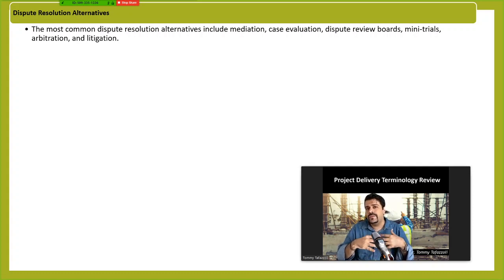Many people believe that the precision in arbitration is a lot better than litigation, because in arbitration, an expert is hired who is great at projects similar to the project that has caused some disputes between the parties. For example, you would invite a senior engineer or senior project manager who has a lot of experience in that type of project. Compare it with court, in which a judge who knows a lot of different things but not very deeply has to make a decision for you.